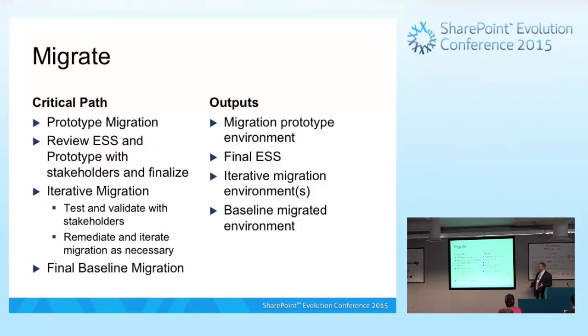Typically speaking, the way that we handled this in our migrations, because again, it's a large amount of data, we only migrate the first 10 to 15% of content, and we limit it to that. So the top 15%, we show them the initial topologies, right? The site collections get created, the top level sites get created. You end up getting like 2 or 3 sites deep, and then it stops. So that we can show them an idea of what this new data construct, this new governance construct is going to look like in the new environment, so they're not surprised.